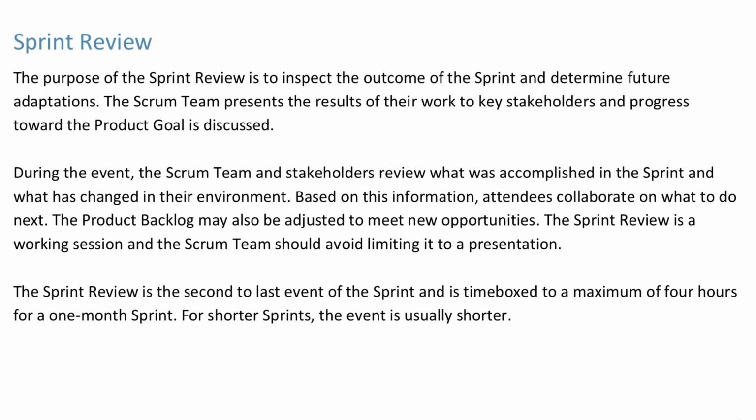The sprint review is a working session, and the Scrum team should avoid limiting it to a presentation. The sprint review is the second to last event of the sprint and is time-boxed to a maximum of 4 hours for a 1-month sprint. For shorter sprints, the event is usually shorter.